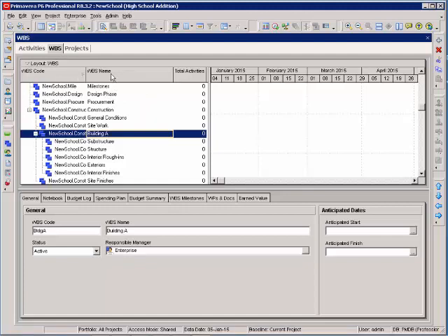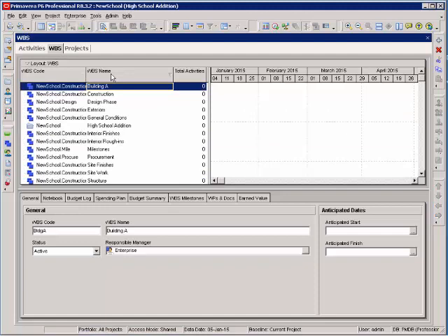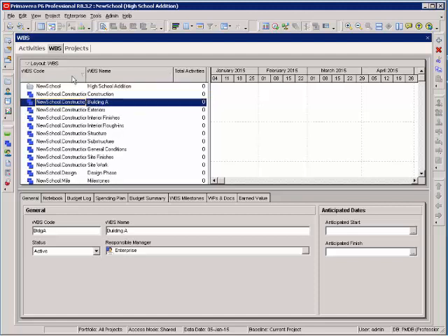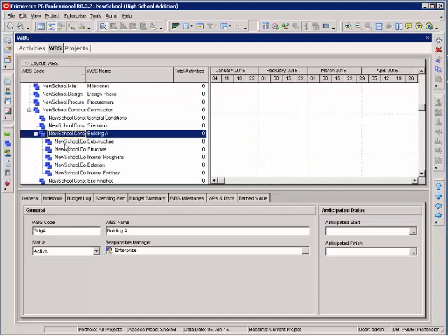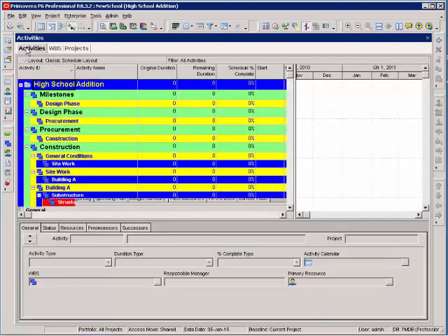In all of your table areas, you can always sort by selecting a heading. This usually comes up in the work breakdown structure. In my classes, someone will accidentally hit a column and will lose their hierarchical view. Since it is hierarchical, I can sort by this column view ascending, descending, and the third option puts it back in that hierarchical view. So if you lose your hierarchical view, you need to select that column heading until the outline shows up again.